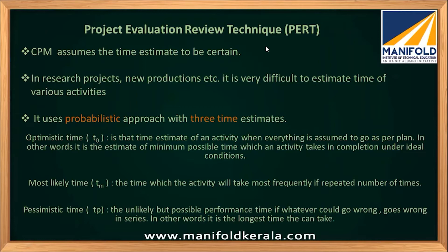Optimistic time is when everything is going according to plan under ideal situations — nothing goes wrong, so what is the minimum time? Most likely time means things are not ideal; some deviations or delays can happen, and based on experience with similar activities, this is the time that will most likely occur. Pessimistic time is when everything is going wrong — it will take maximum time to complete.